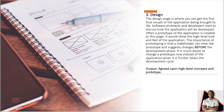The importance of prototyping is that the stakeholder can view that prototype and suggest changes before the development phase. It is much easier to change a prototype now instead of the application when it's further down the development cycle. The output of this phase is agreed upon high-level concepts and a prototype.